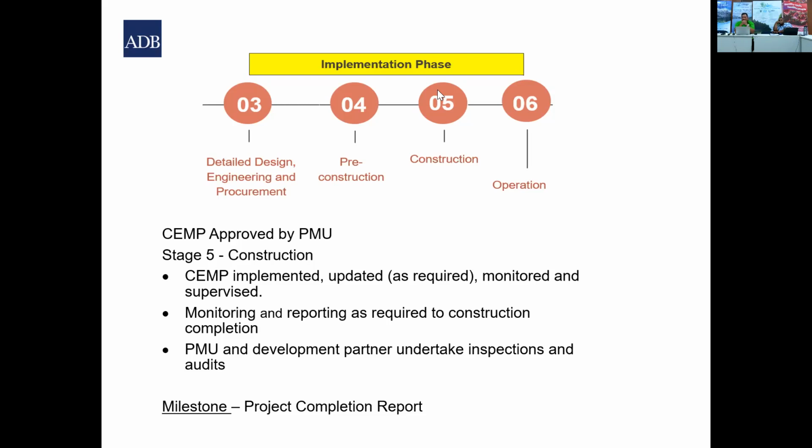But like I said, you're monitoring for compliance, and then you're reporting against what you find out in the field. And the key thing is that you're reviewing and updating your management plans, and that you're tracking the risks along the project cycle, so that it starts from the starting point where you determine the risk level. It should be reducing as the project cycle goes.